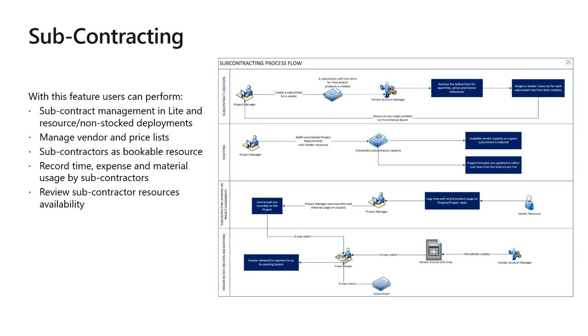And indeed, that's what it does. The selling price is obviously still defined not by the subcontract, but by the pricing on the project contract. And that would still apply to subcontract resources for an unbilled sale if it's a time and materials project. But the costs would then, instead of coming from the default cost price list entries for that particular role, come from the project subcontract, which is of course what you would want for those resources.